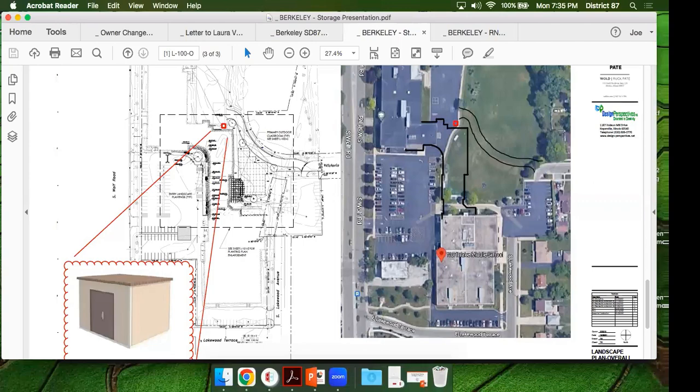So remove, instead of the pad, put the footings and the foundation for the garage extension, if that's something the board is interested in. So we're trying to see if it is beneficial timing-wise, because you've got all of these trades on site over the summer doing the excavating, and I know I'm going to miss something, the ground prep and foundation work, thank you. So that's why we're presenting this, to get some feedback from the board.